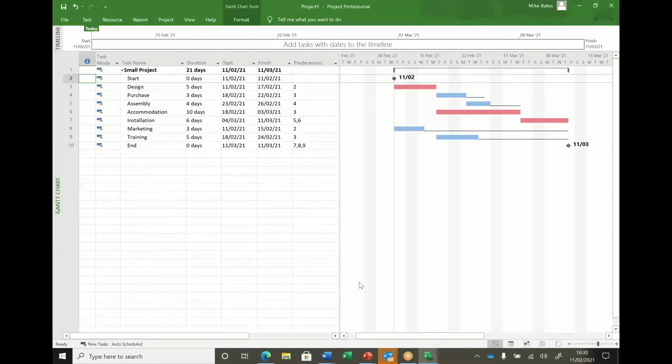Spot on. You see, I knew you'd do it perfectly, Joe. We don't need any woulds. It will. Absolutely right. I'll do this, which you can see is one of the advantages of the software, in a minute. The purchase task has 3 days float, so it can go up to 6 without affecting the end date. That's what the total float is informing you.